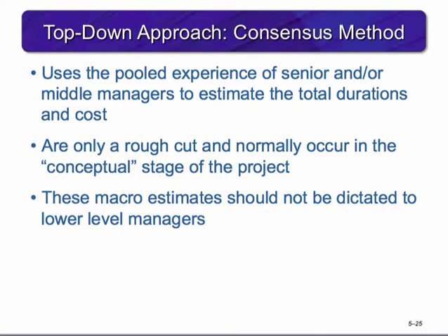It's important to note that these first top-down estimates are only a rough cut and typically occur in the conceptual stage of the project. It is important to not dictate these macro estimates down to lower-level managers, as they might feel compelled to accept the estimate even if they believe it is inaccurate.